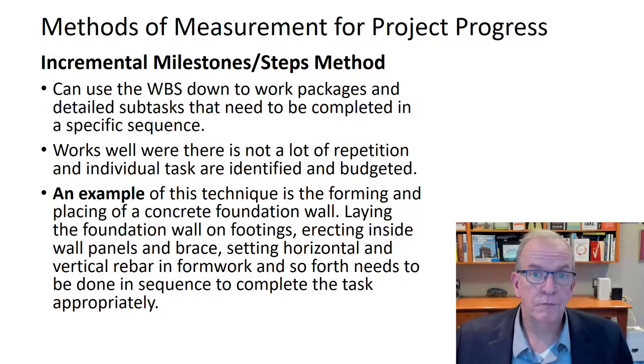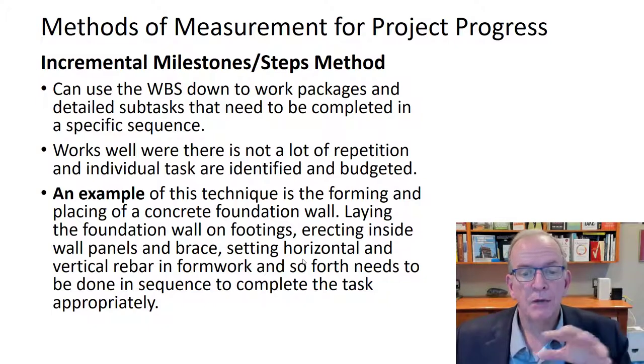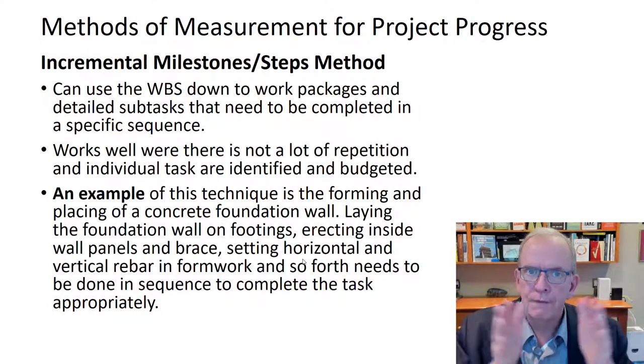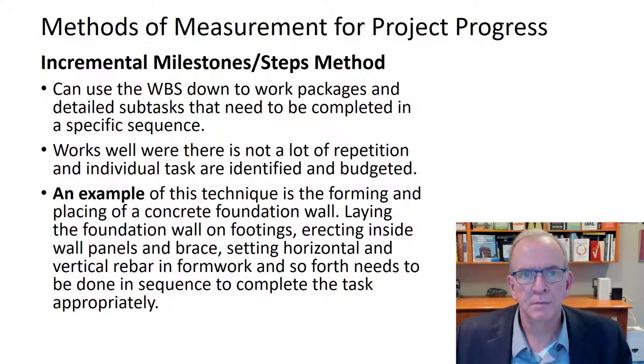So that can work very, very well in things like forming and placing a foundation wall, laying the foundation wall and footings, erecting inside wall panels, brace settings. So you can have different amounts attached to those activities, and because you don't want them to be too large, you can have a very good sense of how much of that is completed.